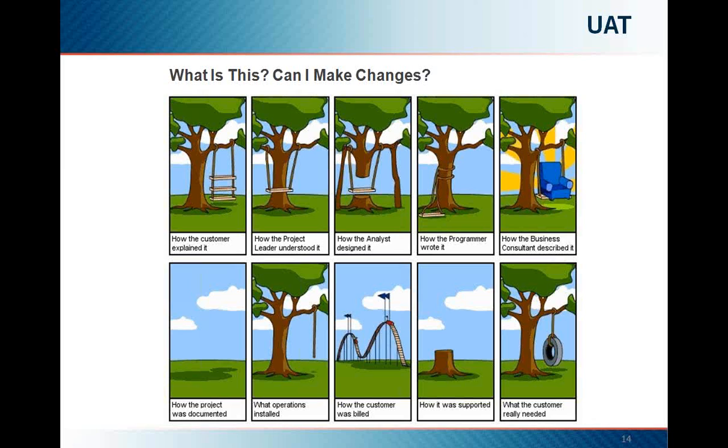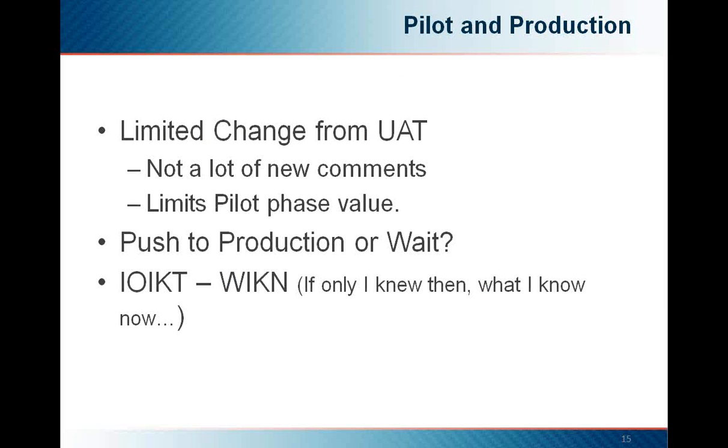Here we are at user acceptance testing. You as a project manager may have planned some time for incorporating the UAT feedback into the application. Although even if that still remains with this project, do you really have time to address anything beyond just a cosmetic change? So here we are. Typically we try to incorporate many of these changes from the user acceptance testing as we can, but because we really can't change anything significant, the pilot often has the same comments that already surfaced in your user acceptance testing, removing much of the value we might show from a typical pilot phase.